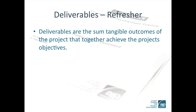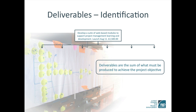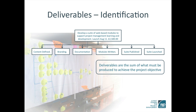So let's take a look at how we develop deliverables. What tangible assets or products does the project team need to produce in order to achieve this objective? Take a look at these deliverables. Does this make sense? If we produce all of these deliverables, will we have achieved the objective? Note that the deliverables are described as outputs, not activities.